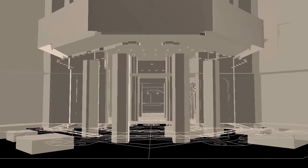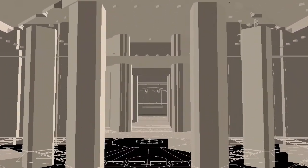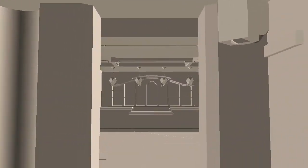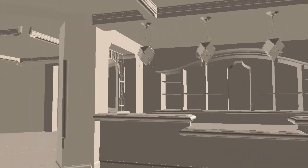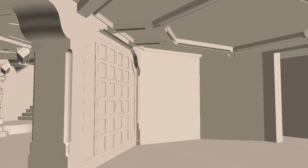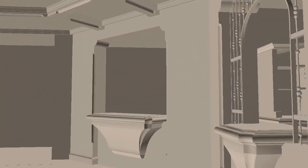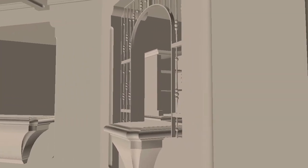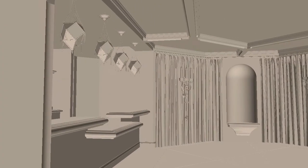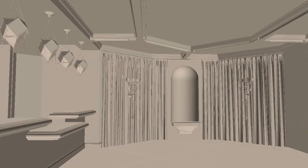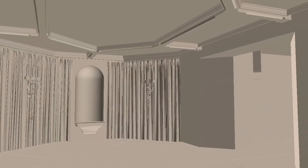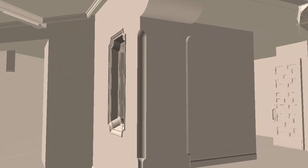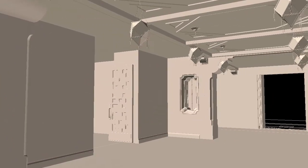One of the promises of this suite of tools is lower costs and clients have certainly jumped on that and also started to change their building delivery methods. One example is changing from a sealed low bid example to a design build type building delivery. What we're walking through now is a restaurant we did for Disney in Southern California and this building was split up into two different packages: one for the exterior shell and structure and one for the interior build out which was my team. For this project I was the BIM executive which meant that I brought all the models together, provided a way to deal with the difference in coordinates between the two, and made sure that all of the models were up to a usable level of detail.